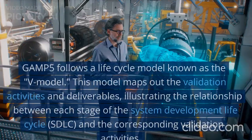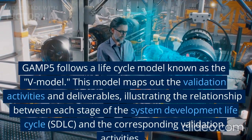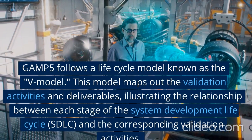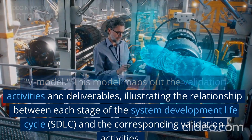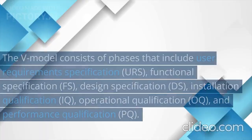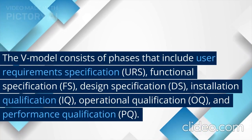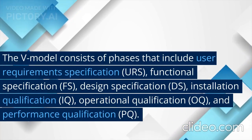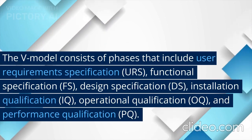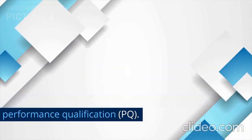Validation Lifecycle: GAMP5 follows a lifecycle model known as the V-Model. This model maps out the validation activities and deliverables, illustrating the relationship between each stage of the System Development Lifecycle (SDLC) and the corresponding validation activities. The V-Model consists of phases that include User Requirement Specification (URS), Functional Specification (FS), Design Specification (DS), Installation Qualification (IQ), Operational Qualification (OQ), and Performance Qualification (PQ).